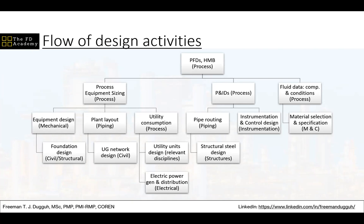But you can have the project engineers there, you can have the project manager there, you can have the engineering manager there. The document controller is only a conduit for channeling the deliverables to the right destination after the deliverables have been produced. It is not the document controller's responsibility to demand the quick creation of a particular document. That is the job of the project manager, project engineer, or the engineering manager. So don't confuse what the document controllers do.